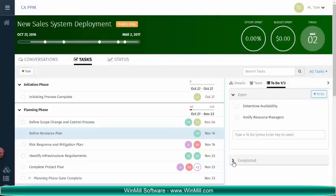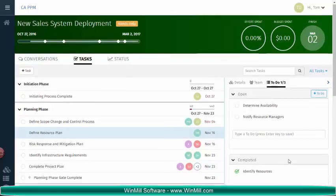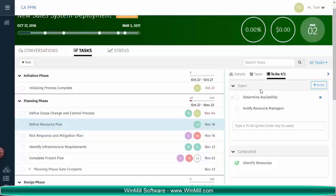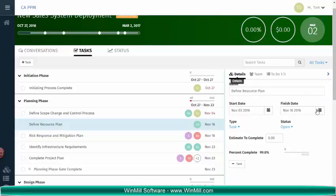If we look down below in the Completed section, we will see our completed to-do items. It's important to note that completion of to-do items does not change the task status or the percent complete.